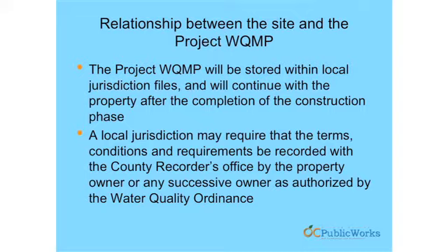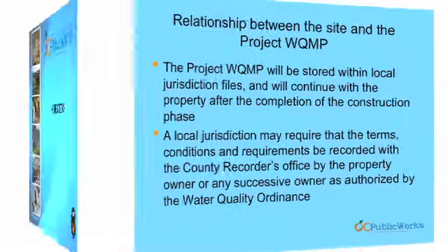And finally, that we are providing a mechanism by which that WQMP lives with the site and transfers with the ownership of the site. And that's, again, left to each jurisdiction to define their process. But most of what we've been hearing is that some sort of a recording at the county level is necessary so that the WQMP comes up in a title search.